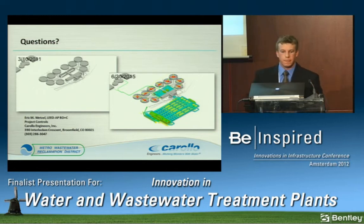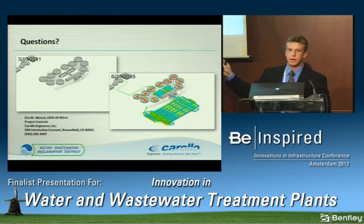What was the time added to the design because of this? It took, from the time we had done the 3D model, which was all the design phase, I think, a year and a half or something that way. Then the contractor started submitting schedules. When the contractor starts submitting schedules, we start linking. By the time they had an acceptable schedule, it took us another 6 weeks to fully link the schedule to the model.